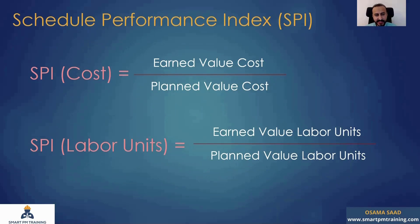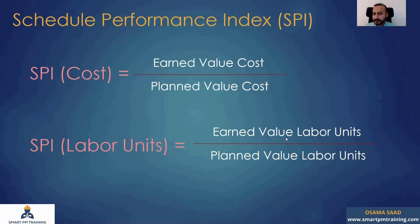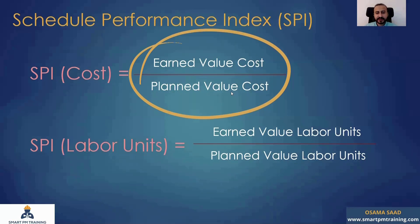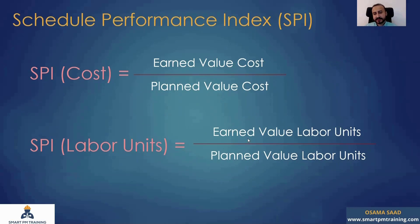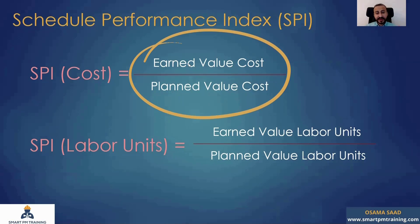Another factor is the Schedule Performance Index, or SPI. In Primavera, SPI appears as a column — there's an SPI for cost and an SPI for labor units. The formula is: earned value cost divided by planned value cost (or labor units equivalent). SPI ranges between zero and one typically. If SPI is zero, earned value cost is zero, meaning no progress at all.